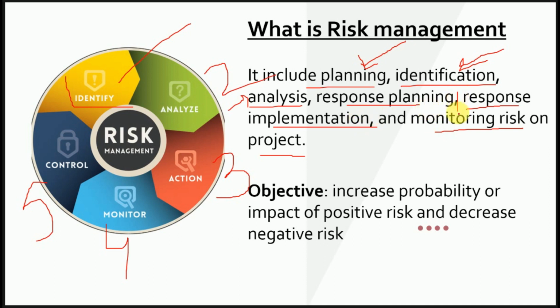Responses for those risks are planned, and then after response planning, those responses get implemented whenever those risks occur on the project. And the effectiveness of those risk responses is monitored throughout the project. It is as simple as that. Hope it is clear for you, right?